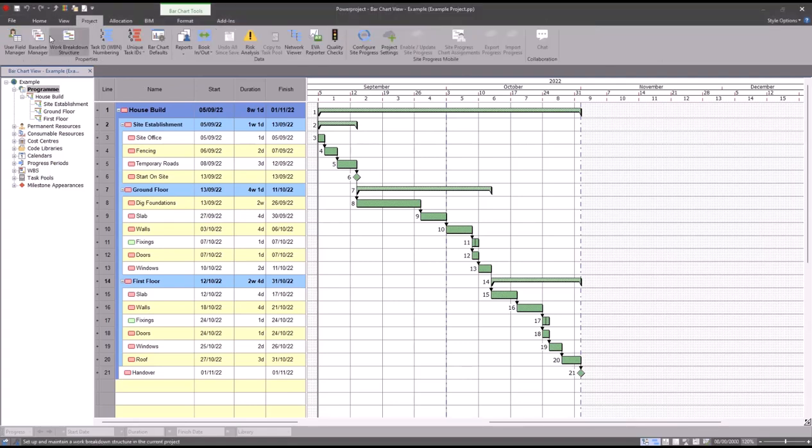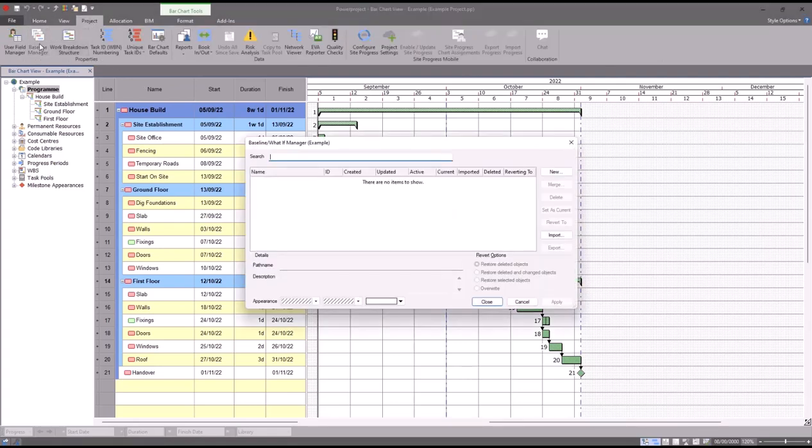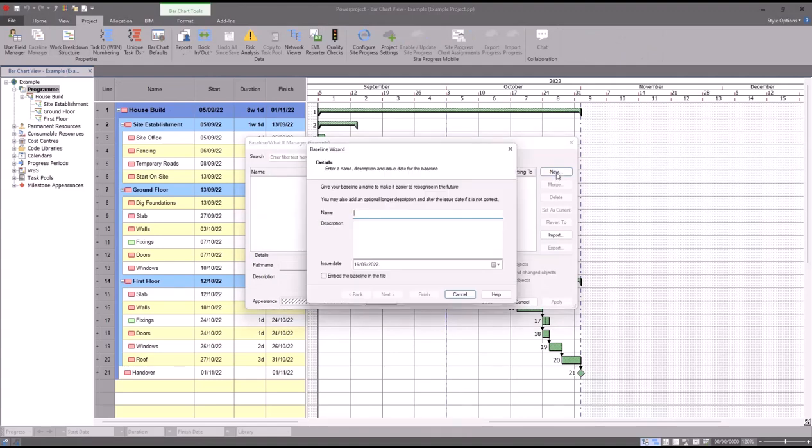To create this baseline, what we do is we go up to the project tab at the top, click the baseline manager, and on the right-hand side we go to new. Give the baseline a name, so in this case I'm just going to call it contract.